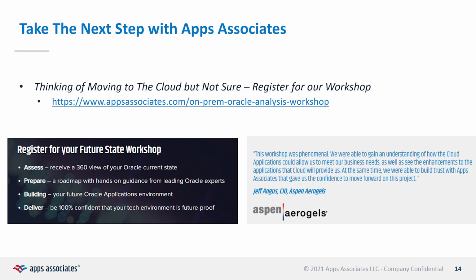So we took a little bit of a different approach. We decided not to bring in legacy data. We only brought in, let's call it, active transactions. We were still using our former parent company's R12 instance as our legacy archival system. So we go back to that one when we need anything, and we made the choice to only bring active data over.